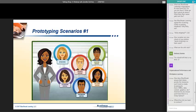How do you see the resources you need? So basically, the graphics and everything, that's part of the contract too. It's part of the assumptions in the contract where we say you're going to provide us with your branding and your graphics. That's all spelled out, what they're going to have to provide us with. It's also in the kickoff call.